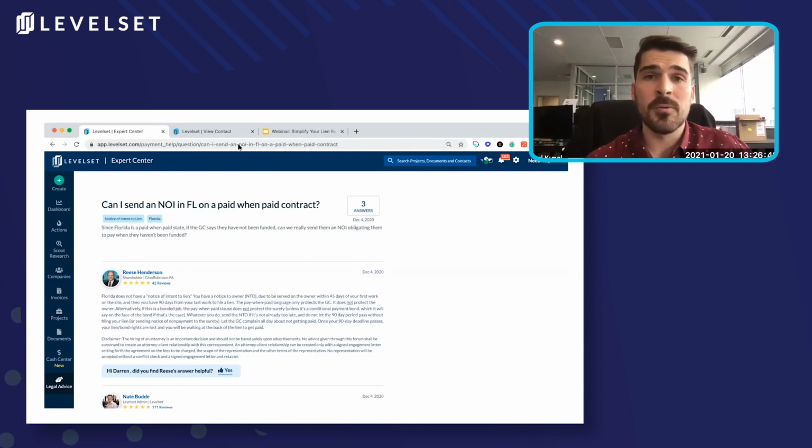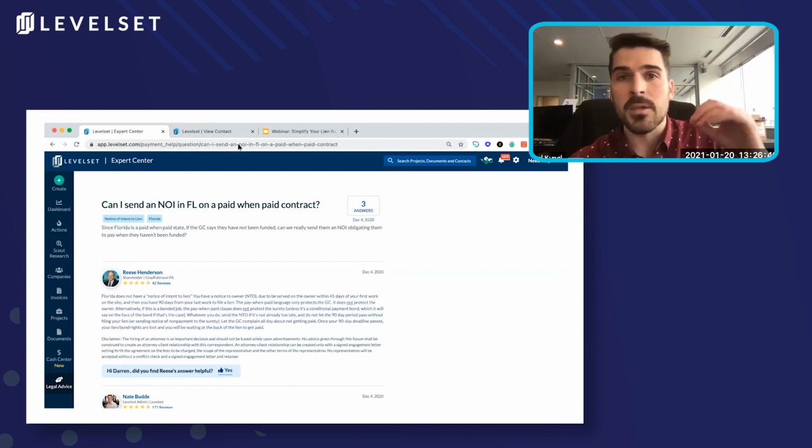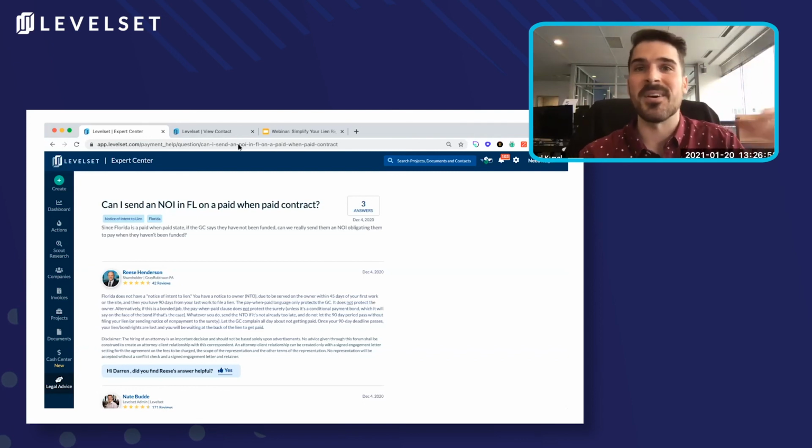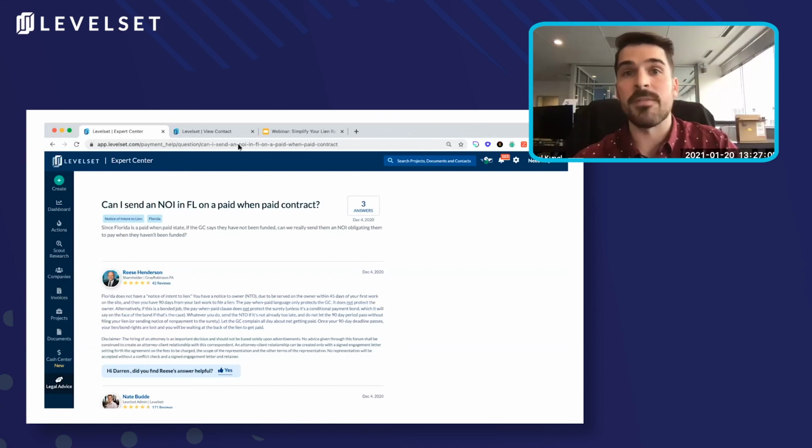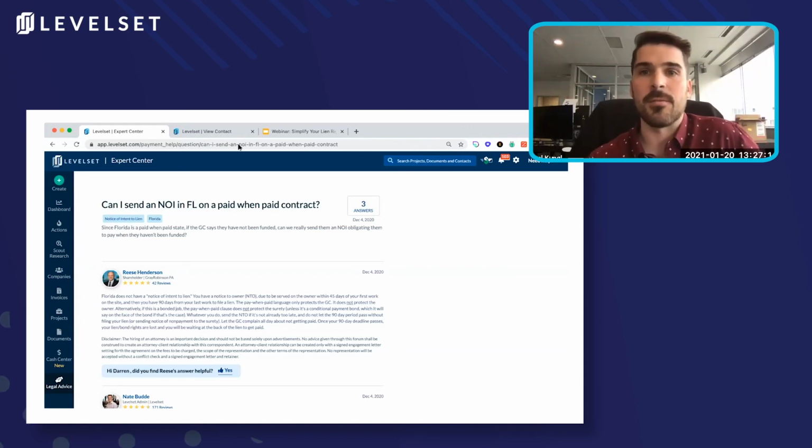Where that's also really helpful is particularly if you're a distributor where you may not know when your last furnishing date is on the project. You know, the customer is not always going to tell you they're finishing the job. As you continue to invoice that customer for that particular project, LevelSet is also able to use your invoice dates to determine when you have finally finished invoicing on the project, so that rather than asking you to log in and keep all of your deadlines up to date, the system will go ahead and do that automatically for you too. So regardless of which software system you use, being able to integrate provides a lot of benefits when it comes to keeping up with lien rights and addressing some of the challenges we talked about earlier.